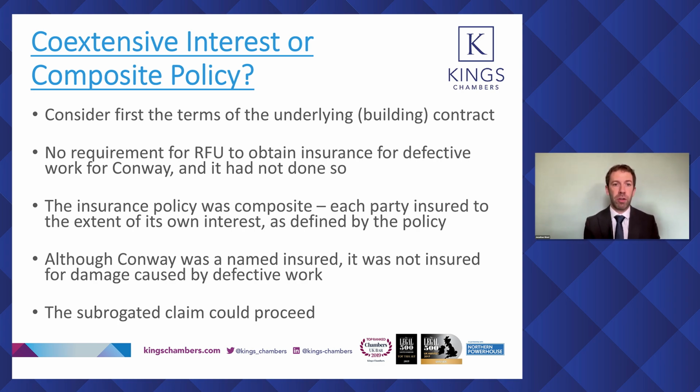And when RFU procured the policy for itself and as agent for Conway, it did so in accordance with the authority conferred on it by the JCT terms, specifically option C of the JCT, which required an all risks policy, but which didn't require a policy that protected Conway against the consequences of its own defective work.